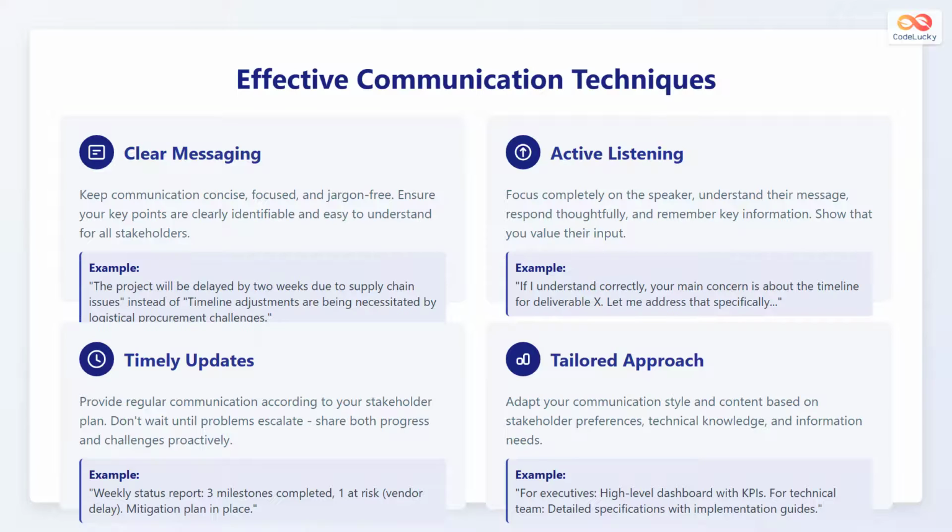Fourth, use a tailored approach. Adapt your communication style and content based on stakeholder preferences, technical knowledge, and information needs. For example, for executives, provide a high-level dashboard with key performance indicators, and for the technical team, provide detailed specifications with implementation guides.